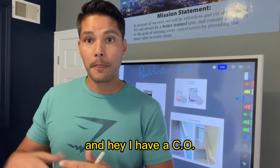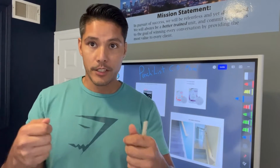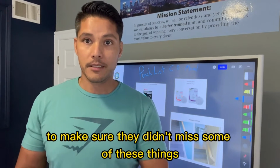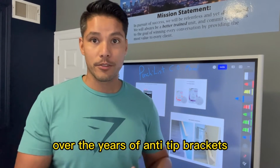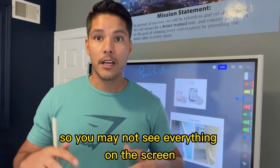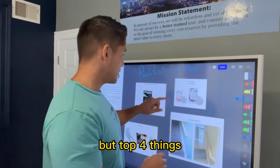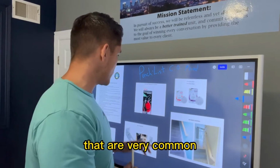Ask them on the front end, hey, I have a CO punch list from the township. Can you include this in your scope of work? Great. It just gets the whole thing out of the way, and then go behind them and make sure they didn't miss some of these things. What I've been doing is stocking up on a lot of this stuff over the years, like anti-tip brackets and different things that we'll go over in a second. You may not see everything on the screen, but you'll see some images appear throughout the video. The top 4 things I will always say are missed, that are very common.